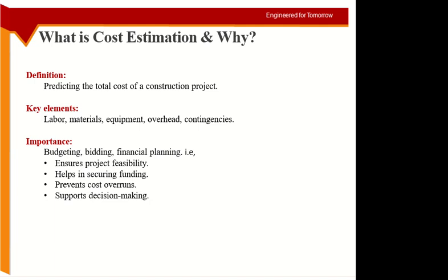Okay, so there are many intersections and roads in Bahrain where you feel that the problem is existing for so many years but nothing is being done. Okay, because, obviously, I don't have inside information, but it could be because all the options for that particular site are very costly. The land is not available, you have to buy the land and you have to move people and so on and so forth. So the required cost is a very important element of feasibility of the project, which project to go for, and in that project which option to go for.